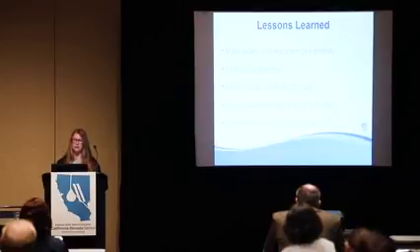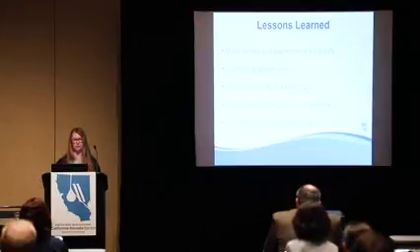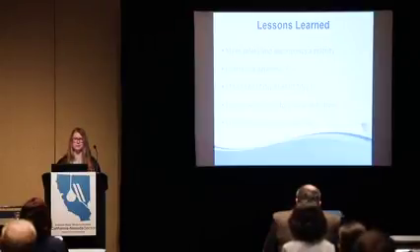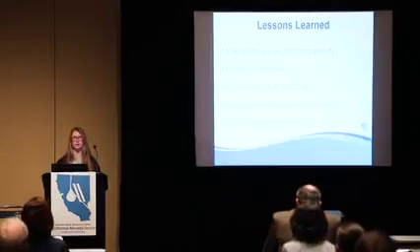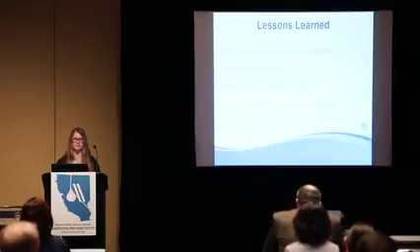And then, of course, start early on the permitting. The environmental permitting always takes a little bit, and the local city permitting always takes a little bit longer than any approvals we're getting from Division of Drinking Water, so we started on those early. Being able to engage with regulators early and often. This is something that we did starting in late 2016. We knew this was coming, and we started our design and our discussion with our local engineers in 2017.